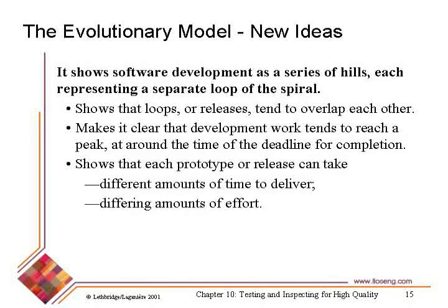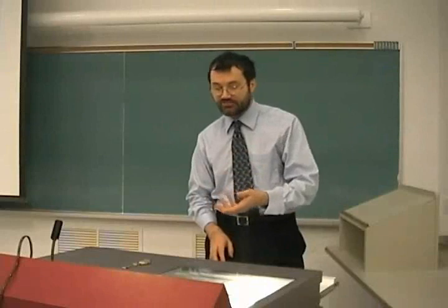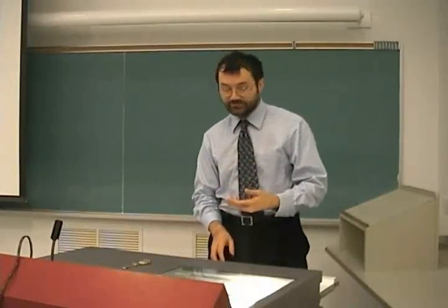So the waterfall model still underlies some of this in some ways. We still have sort of mini waterfalls following each of these humps, except the maintenance is gone. The maintenance is just the next release and the next release and the next release. So each of these phases is, as I said, like a little mini version of that phase, except that we still embrace the notion from the spiral model of risk analysis at the beginning and review at the end.